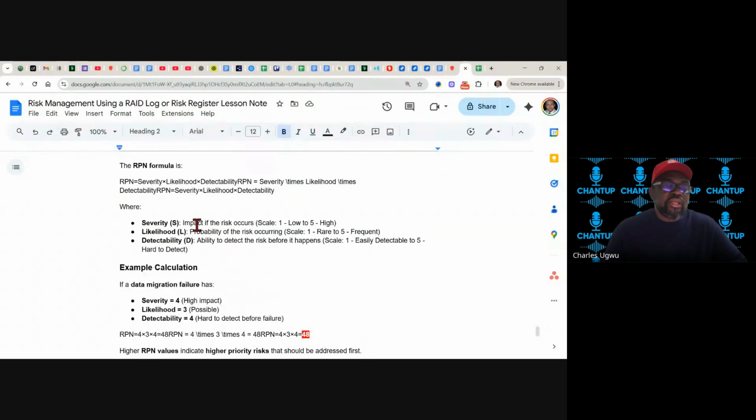What do you think is the impact of this? Some will say 2, some will say 3, some will say 4. So you come up with the average. The average of that could be 4. If that's the case, it means on a scale of 1 to 5, you got 4.